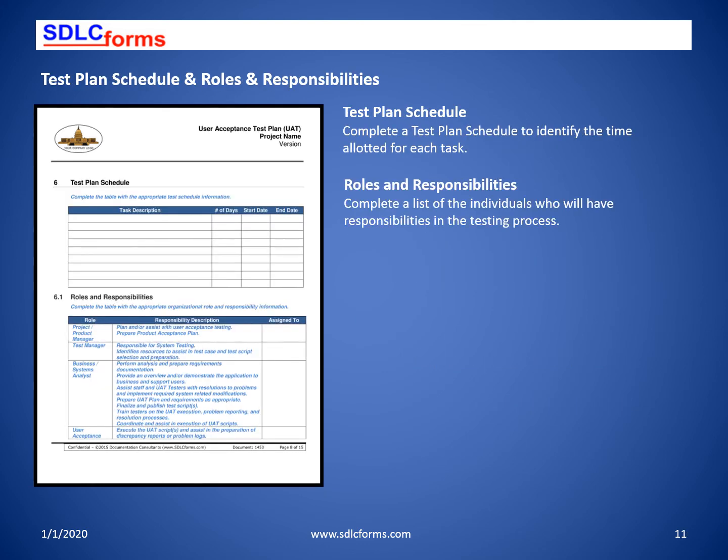For the test plan schedule, create a list of the tasks, the number of days allocated for testing, and the estimated start date and end date. List all the people who will be responsible for testing by identifying their role, a description of their responsibility, and who the role has been assigned to.